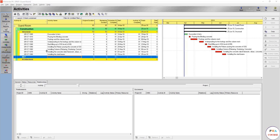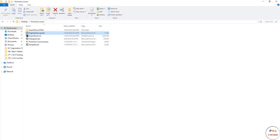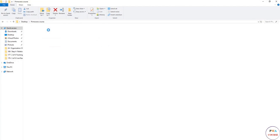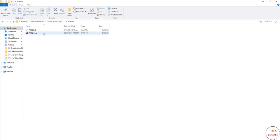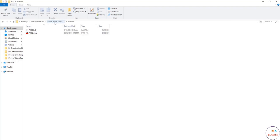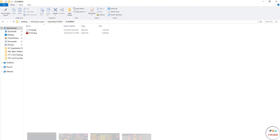In our case, we're most probably doing a tender schedule because we don't have enough details in the drawings. There's a lot of things that we don't know that much. As you see here, all the drawings that we have is very minimum—it's only one drawing for plumbing. It's not showing each and everything, and there is no drawing for electrical. So we have to assume a lot, and also keep the schedule as high level as much as possible.